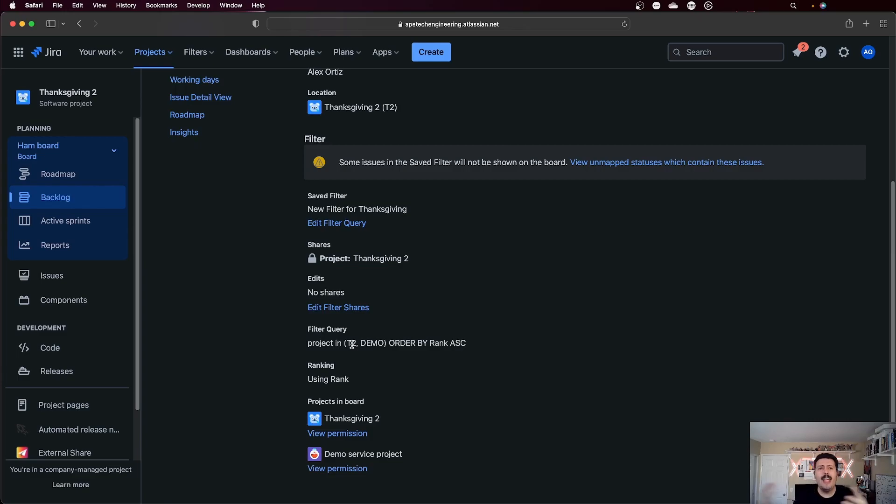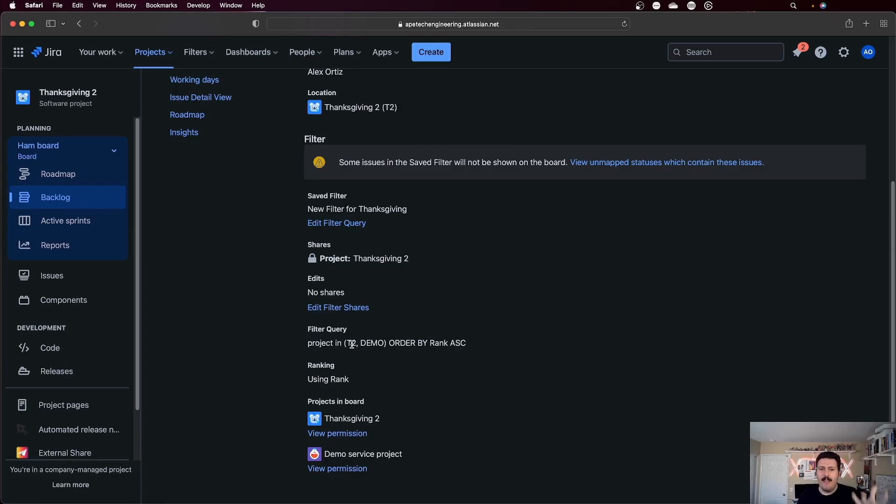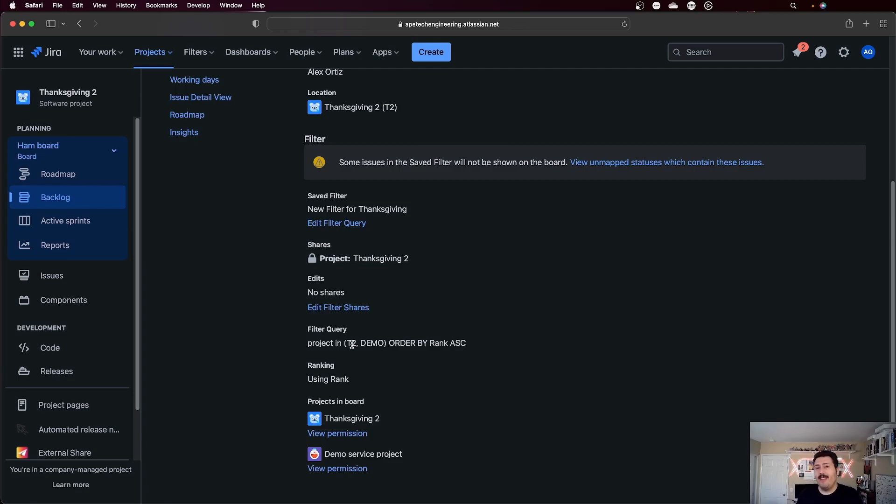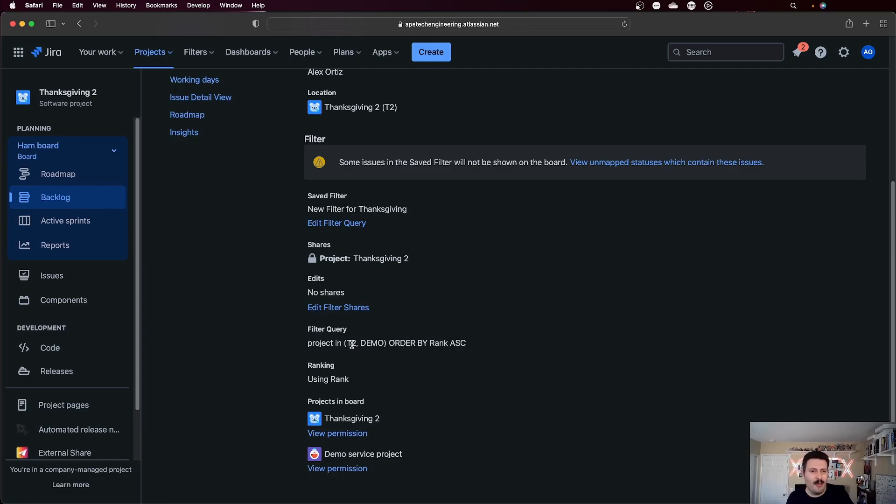So you want to be very mindful that however we design this, you try to avoid this, but you might not always be able to avoid it. So then you have to do that trade-off analysis where you determine, is it worth having everything in one view versus having that backlog view? So if you're a Jira premium user, if you already have the advanced roadmaps, you might just not even care about this because the advanced roadmap supports multiple projects in one view. This might be a moot point for you there.